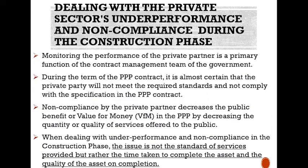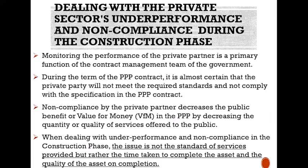Dealing with the private sector's underperformance and non-compliance during the construction phase. Monitoring the performance of the private partner is a primary function of the contract management team of the government. During the term of the PPP contract, it is almost certain that the private party would not meet the required standards and not comply with the specifications in the PPP contract at some point. Non-compliance by the private partner decreases the public benefit or value for money, decreasing the quantity of services offered to the public. When dealing with underperformance and non-compliance in the construction phase, the issue is not the standard of services provided, but rather the time taken to complete the assets and the quality of the assets on completion.